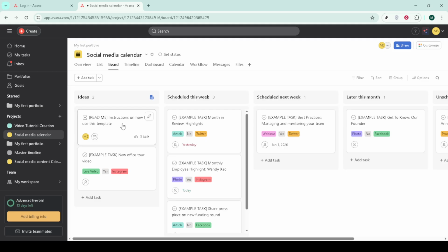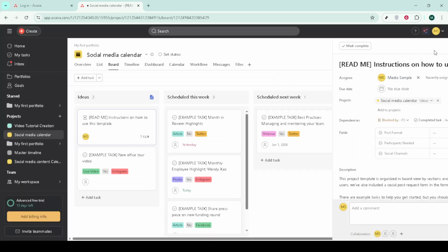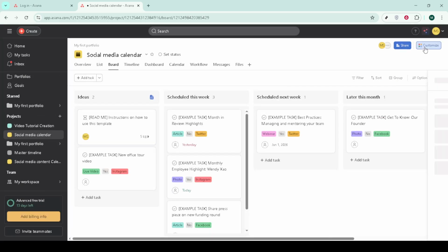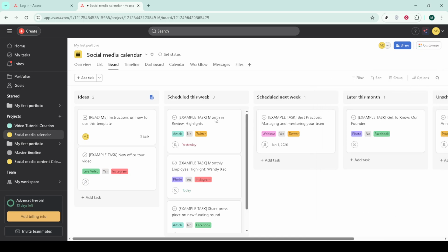Next, add custom fields to capture the data you'll use for decision-making: priority, story points, sprint number, Scrum stage, and effort. Use drop-downs for priority and Scrum stage, and numbers for story points and effort. If your team estimates with Fibonacci points, reflect that in the field options. These fields enable meaningful sorting, filtering, and reporting.